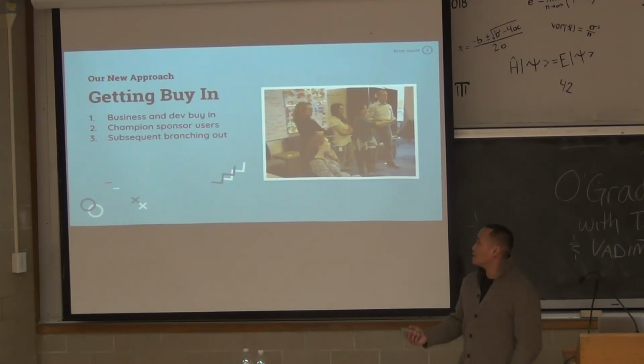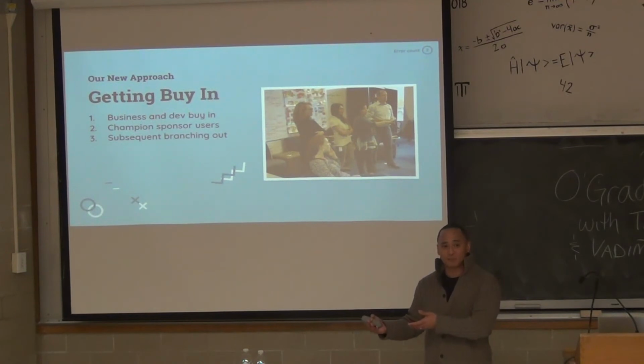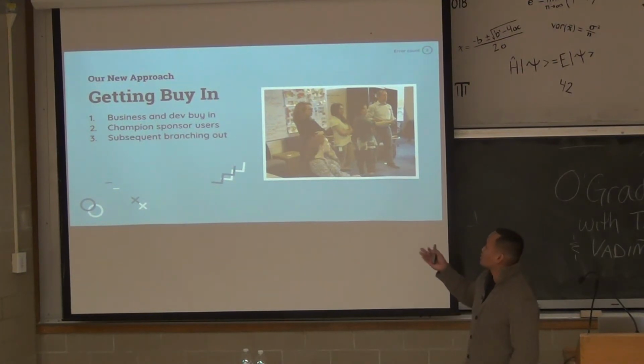And then we had to get buy-in. Business and dev buy-in, reevaluating that process, getting the business buy-in, showing them our mock-ups early on, handing that off to the technical team, saying, hey, is this actually technically feasible, knowing the platform and its limitations? And then championing our sponsored users. So this is an important point to note.